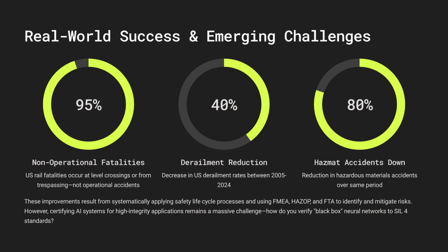The client mandated the appointment of an independent safety assessor, or ISA. Often, this is a specialized third-party consultancy. ISA, what's their role? Are they designing the safety systems? No, they don't design anything. Their job is independent oversight.